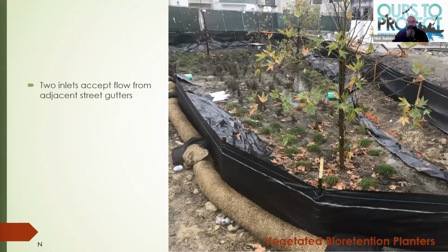Here's a good example that we just had happen recently. It's got some great protections around this during construction, but the problem is that the storm drain is tied into it. And the construction site accepted a bunch of sediment from the project into the storm drain system, which flows to these features. And if you look closely, you can kind of see that this area is starting to get mucked up. This is a soil that, who knows, may now prevent water from infiltrating into it.